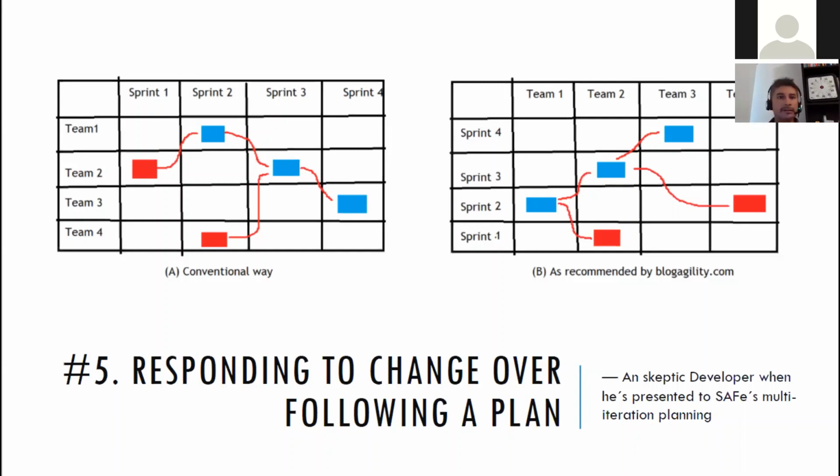We had this experience from a South African manager in the last SAFe event that we sat in, the RTE course. She said, okay, there was a time that I had to do a PI planning, and after the first sprint, I realized that requirements changed, and we had to do a PI planning again. It's not that you do this and you do not revisit this. You are revisiting this in every sprint planning, and things will change. And actually, this is one of the elements that you will see, that things will change here.